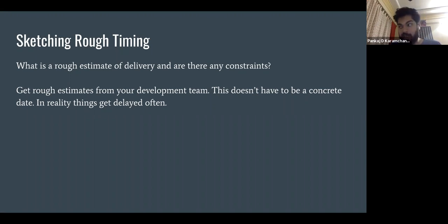If there are things that are blocking your developers, which is increasing the timeline that they need, then figure out how you can resolve these blockers. Blockers are things which will slow them down or something which is blocking progress. So you figure out how you can resolve them or help them out. Like, is there a meeting which needs to be set up with a different team in order to resolve this issue? Or what is it? It could be any kind of problem that you might be facing during development.